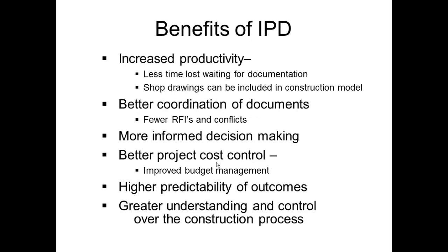They give us some more benefits here on predictability of outcomes, fewer requests for information and conflicts. If we're talking new construction, this could work really well. If we're talking renovation of an existing building, not so much, because there are so many unknowns that we run into when we talk about renovations.